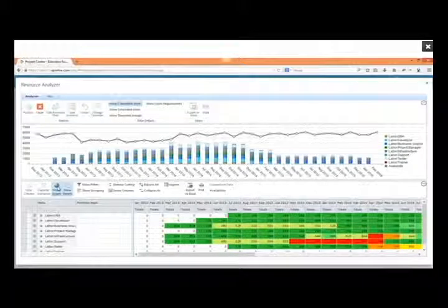I can say show graph, and it builds a dynamic chart showing my total availability of my whole team and how much each role is actually taking up of that. So it looks like overall my whole team is not over allocated at any particular time, but certain groups like support, for example, is over allocated. So maybe we need to hire some more support people to help make up for that, and maybe let go a few people in other areas where we don't quite have the demand.